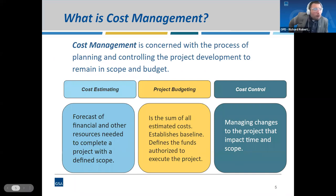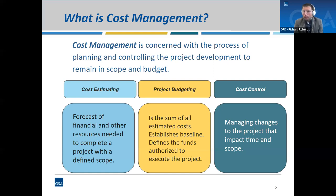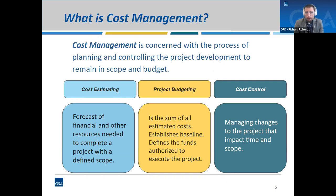So what is cost management? GSA's cost management is concerned with the process of planning and controlling project development to remain within scope and within budget. Without a scope, there's no budget. There are three main components: first is cost estimating — a forecast of financial and other resources needed to complete a project with a defined scope. Think about cost estimating as being part art, part science. I compare an estimate to a hurricane forecast: depending on how close you are to the award date, the path can be predicted more accurately — just as a hurricane path can be predicted more accurately closer to landfall.